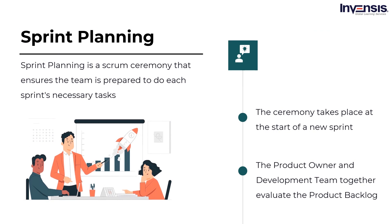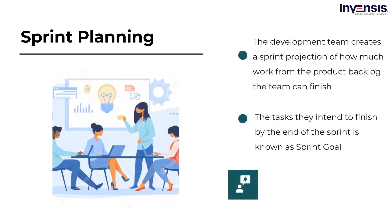The first ceremony is Sprint Planning. Sprint Planning is a Scrum ceremony that ensures the team is prepared to do each sprint's necessary tasks. This ceremony takes place at the start of a new sprint and is intended to bring the product owner and development team together to evaluate the product backlog — a prioritized list of tasks for the development team based on the roadmap and its objectives. Sprint Planning prepares the entire team for success during the sprint. The product owner will arrive with a prioritized product backlog, they debate each issue with the development team, and the group assesses the effort required. The development team will then create a sprint projection indicating how much work from the product backlog the team can finish.